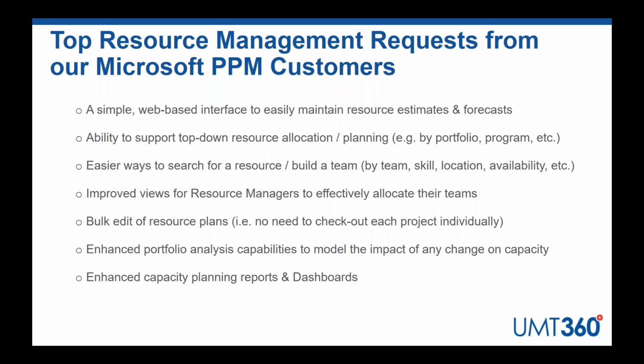When Microsoft released Engagements, which was a great step forward in terms of the handshake between a project manager and resource manager in terms of allocating resources, it actually deprecated that web-based resource plan, okay? And most of our customers said, okay, I love this new engagement feature, but I need that web-based resource plan, but I need to do more stuff anyway, right? That was our main reason for getting into this. So if you're in Project Online or Project Server 2016 today, you won't have that web-based resource plan out of the box as was in previous versions.